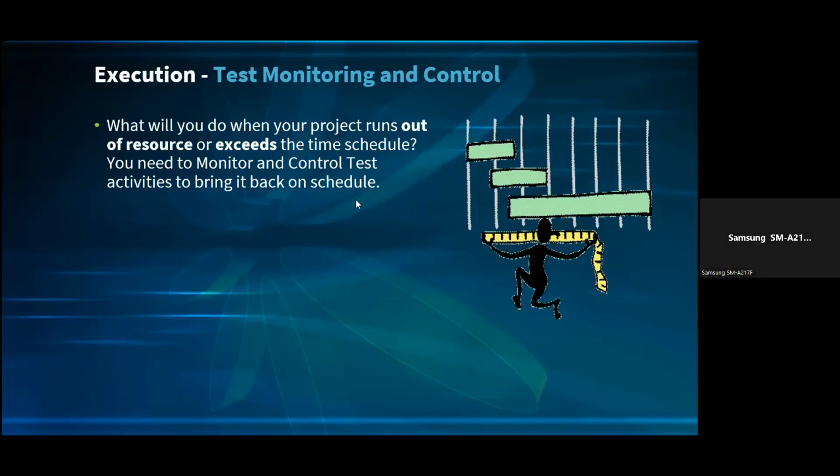Like I said initially about the resources, you might think that this project will need just one tester. The workload might be too much for one tester. So it should have been part of your test plan. You would have stated what your contingency plan is if it's more, what the mitigation plan is.